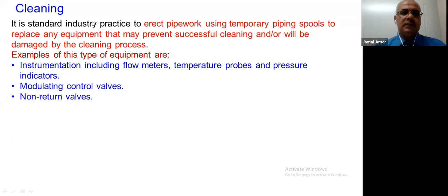It is a standard industry practice to erect pipe work using temporary pipe spools to replace any equipment that may prevent successful cleaning or will be damaged by the cleaning process.